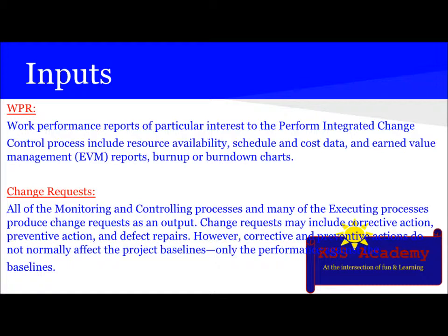Next is change request. All the monitoring and controlling processes and many of the executing processes produce change requests as an output. Change requests may include corrective action, preventive action, and defect repairs. However, corrective and preventive actions do not normally affect the project baselines, only the performance against the baseline.